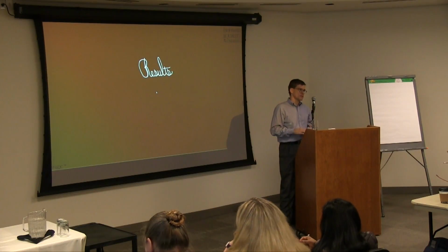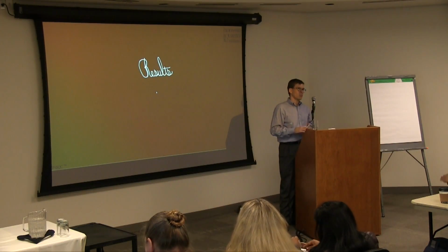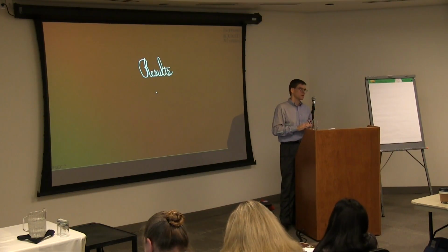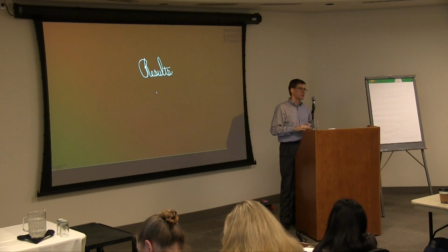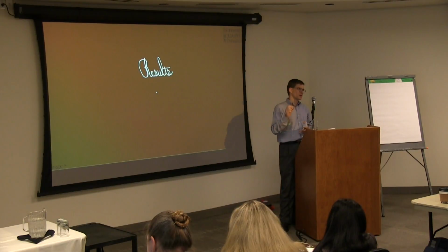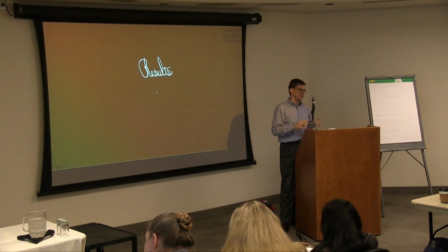We developed much better relationships with the developers. We worked together as a team. It was the team's goal at the end of the day. We've realized this, where the team was responsible for the quality and for getting the job done. To that end, the developers wound up over time switching their workflow so that they finished their development work days before the end of the sprint, which gave QA enough time to do the validation, both automated and manual. It also gave them the bandwidth to participate in that effort. So often we would have developers assisting us with writing those automated tests and with providing the manual validation to allow us to get that job done.